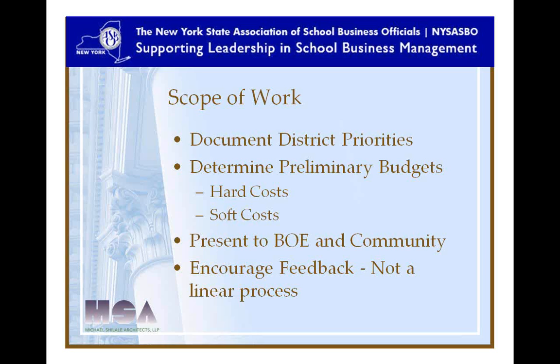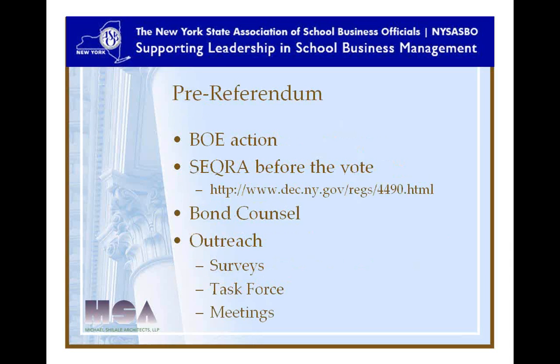We had one project which I'll tell you about in the pre-referendum issue, where we're doing some artificial turf fields, and the referendum and the bond counsel had written the resolution so tightly that we couldn't convert the artificial turf to a natural turf field in our process. And it turned out the community was not in support of artificial turf. This was some years ago when the crumb rubber infill on those artificial turf fields were a bit suspect, and they had some environmental issues.